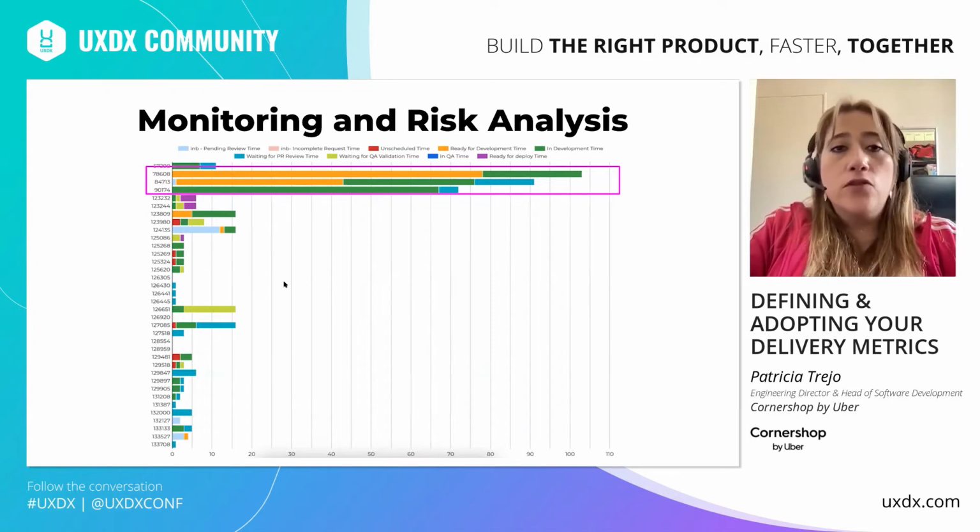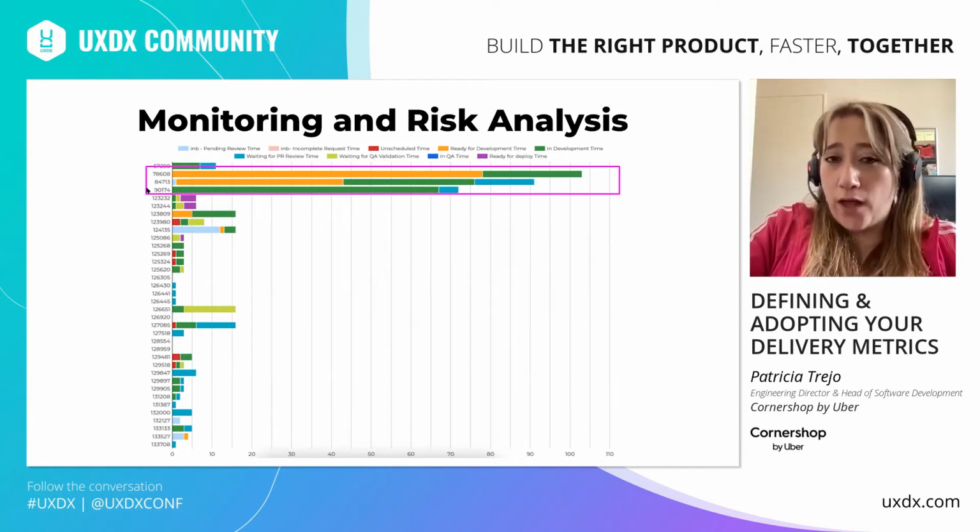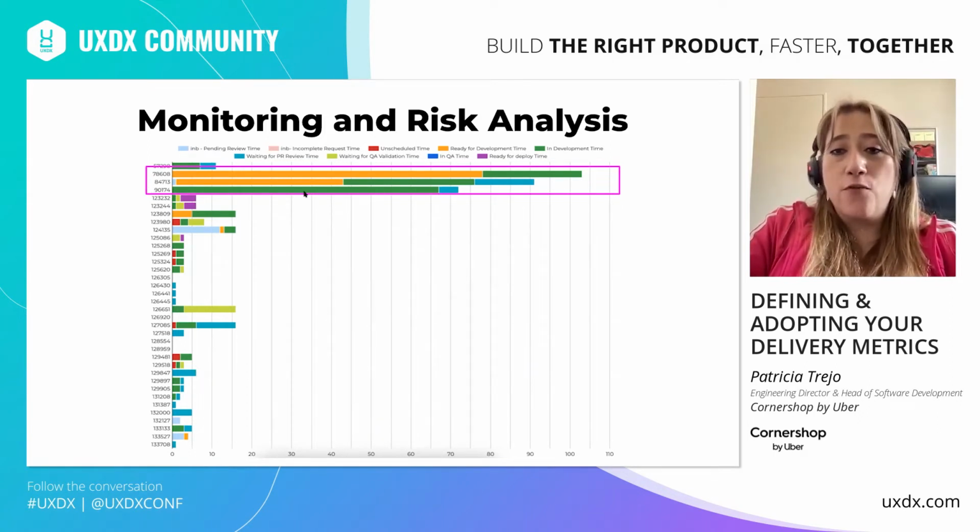But here is also something interesting. The card IDs on the vertical axis are ordered from smallest to largest. In general, issue trackers assign card IDs consecutively, so we can conclude that the cards that took a long time are older because they have smaller card IDs. Indeed, in this particular case, the team didn't know how to use the issue tracker well at first, and therefore they did not move the cards from one state to another when appropriate.